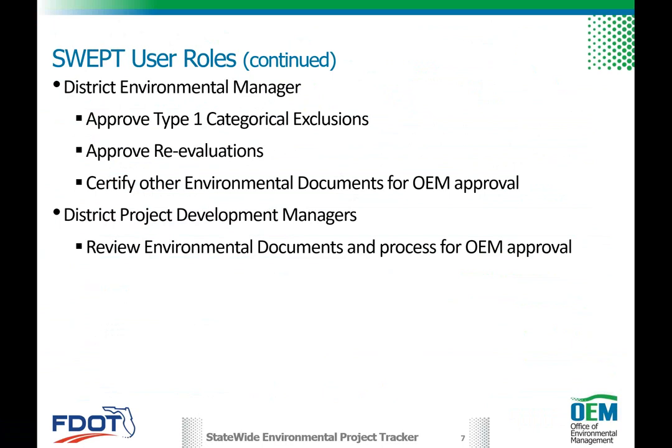Either, through that coordination, you recognize that there's low risk on the reevaluation, maybe timing-wise, it's very close to when the evaluation was completed, or just the nature of the action being reevaluated. You can have a conversation with your PDC and recognize that, oh, there's low risk, we're just going to sign this down here in the district, and that's called a consultative process.